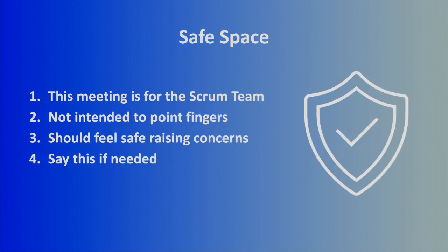The retrospective is really supposed to be a safe space for the team. So when it comes to this event, I don't recommend inviting higher ups or managers or anyone really outside of the team, right? This is an event for the team, for them to reflect, and come up with ideas on how to get better. And you really can't have those great conversations if they have a manager there they're afraid to speak about, right? If they're thinking, if I say this, the manager's going to hear it and then get mad, you're not going to get the feedback you need. So it's important to make sure that the meeting is just for the Scrum team and you're inviting the right individuals to that event.